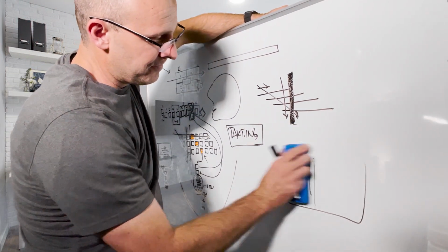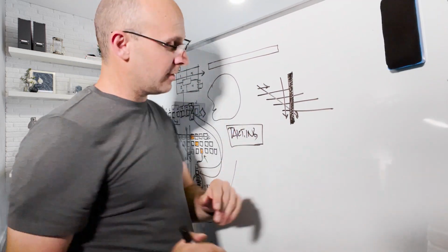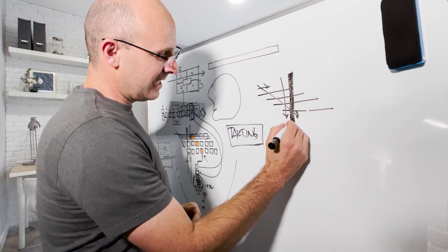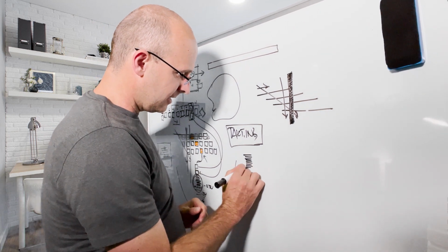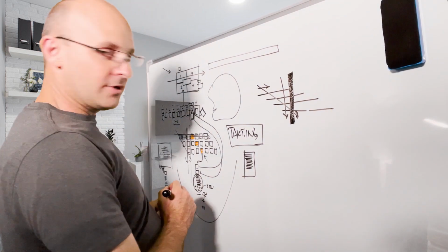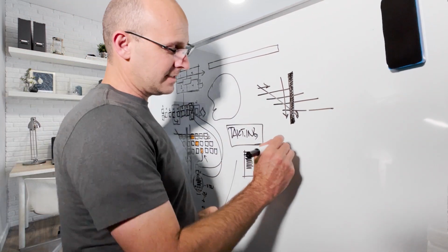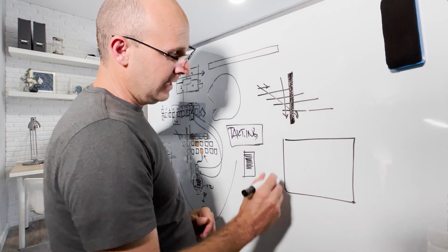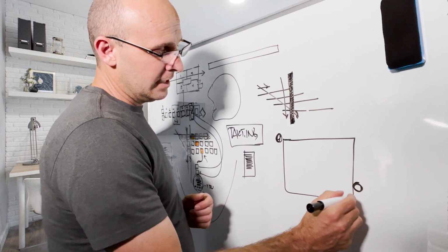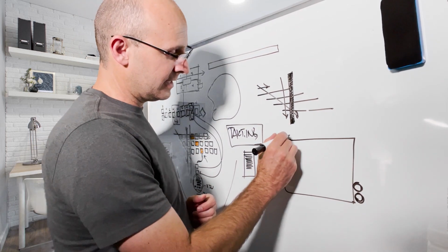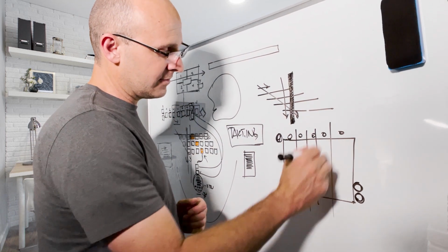If you're using Scrum, and there are some people that are like, yeah, on a weekly basis, I'd rather use Scrum. Okay. So in that week, whether you're using Takting, which will give you these work steps in little cards, or your Excel template where you put it in a separate tab, you can literally copy and paste. And if you have a Scrum board, you all know that in Scrum, you do a weekly planning meeting at the beginning of the week, and at the end you do your sprint review and your sprint retrospective, and then every day you huddle in the morning for your sprint, Monday, Tuesday, Wednesday, Thursday, Friday, right?